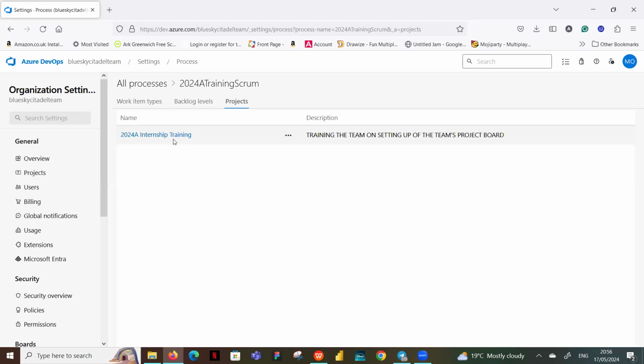Do you understand? That's why you customize, you bring out an inherited process. It's like having a branch out of a main thing, so that whatsoever we do stays on that branch. It doesn't affect others, specifically for your own team. Okay, thank you. You're welcome.